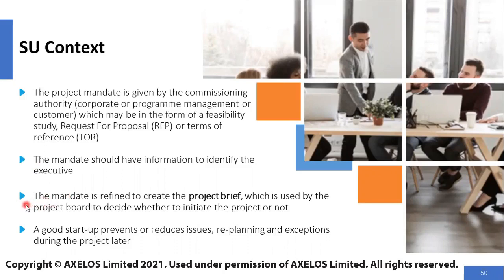The mandate is refined to create the project brief, which is used by the project board to decide whether to initiate the project or not. The project brief includes the outline business case, the project description or a background, and the project product description, among other things. And even the project level tolerances. A good startup prevents or reduces issues, replanning, and exceptions during the project later on.